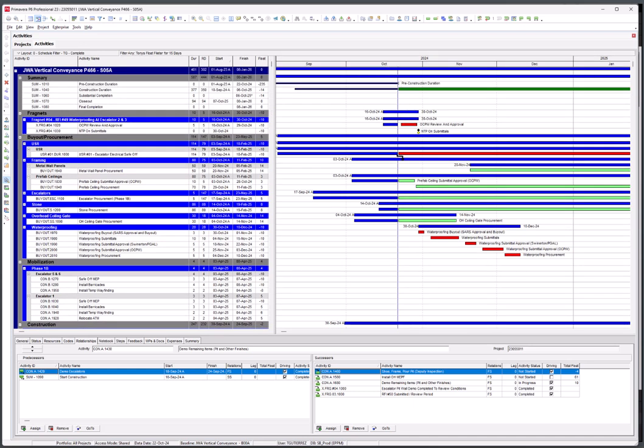So this first one, the -10, we already had seen that one. That was a USR. Here it is. Then here's another one. So prefab ceiling submittal, right? It's not the long path, but look, it has 3 days of float. So if we lose 3 more days, it's going to be 0 float and then eventually more. So I probably want to make sure we're tracking that one.